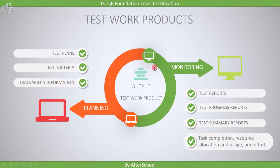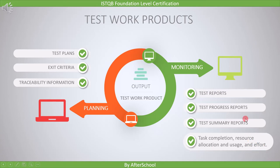Now let's see the output of the test monitoring stage. Test monitoring is done at each test activity, and at the end of that test activity, we collect the test report of that stage, such as the test progress report and test summary report. During test monitoring, we decide if the task is completed, resources are allocated properly and used efficiently, or if additional effort is required.